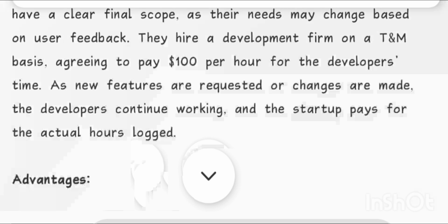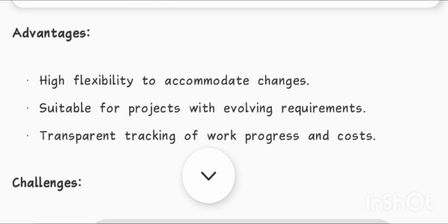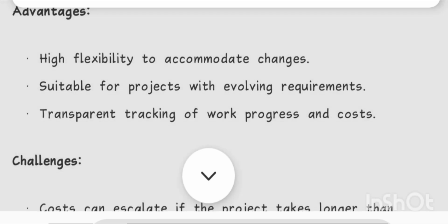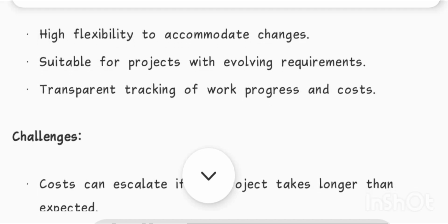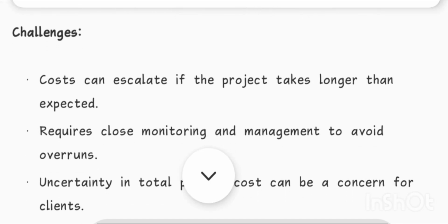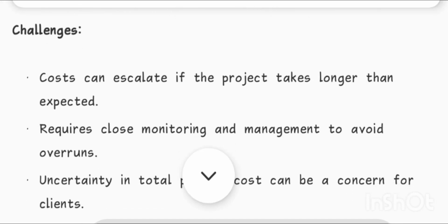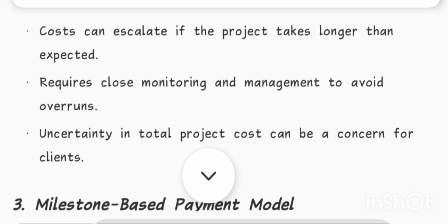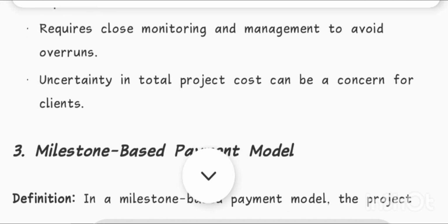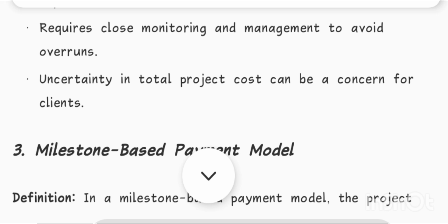Advantages: high flexibility to accommodate changes, suitable for projects with evolving requirements, transparent tracking of work progress and costs. Challenges: costs can escalate if the project takes longer than expected, requires close monitoring and management to avoid overruns. Uncertainty in total project cost can be a concern for clients.